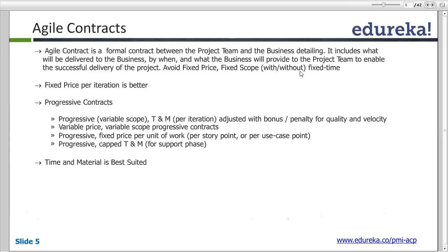One of the best recommended techniques is fixed price per iteration. So if my team had eight people, and each person works eight hours a day for 15 days in a two-week iteration or for a three-week iteration, that gives the cost. The cost is known and it would be irrespective of the features delivered.